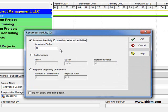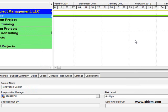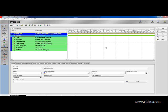If you want the activity IDs to renumber the same and maintain the same activity IDs as the original, just leave increment activity ID based on selected activities checked. Hit OK and in just a second you will see the duplicate show up.